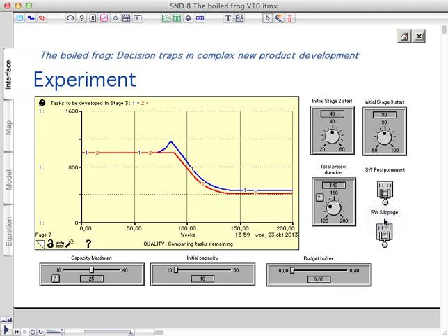If we also forget about the schedule slippage effect, that's the idea that we postpone days to a later stage, that also has a positive effect, because that means that stage 2 starts sooner. Yes, there's still work left in stage 1, but so be it. So that's actually also a positive effect.